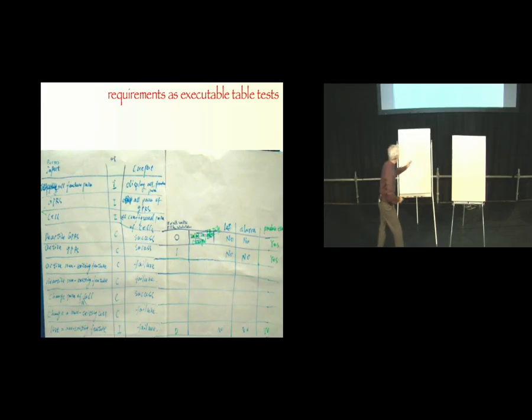And now to connect this to Scrum, one of the rules in Scrum, and by the way, I've noticed this is one of the least known rules in Scrum, is that a minimum of 5, maximum of 10% of every sprint must be spent by the team on what's called product backlog refinement or grooming, where the team is doing splitting of big requirements into smaller ones, low-level requirements analysis, and re-estimating the entire release backlog.